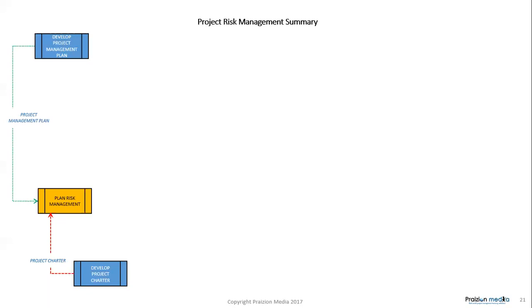Now, remember, risk is perceptual. For this reason, you also need to include stakeholders in risk discussions early. We have the identify stakeholders process supplying plan risk management with a stakeholder register for this reason.